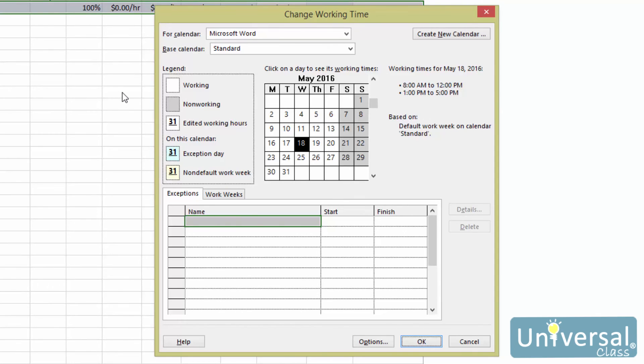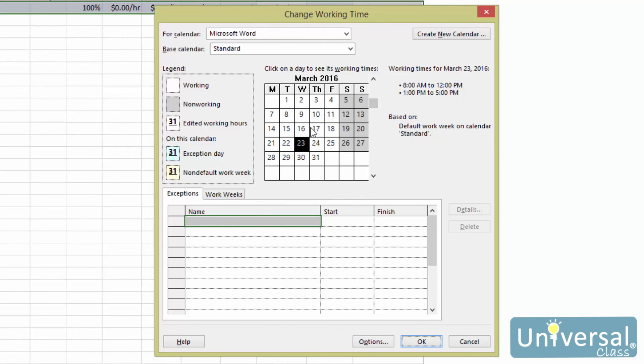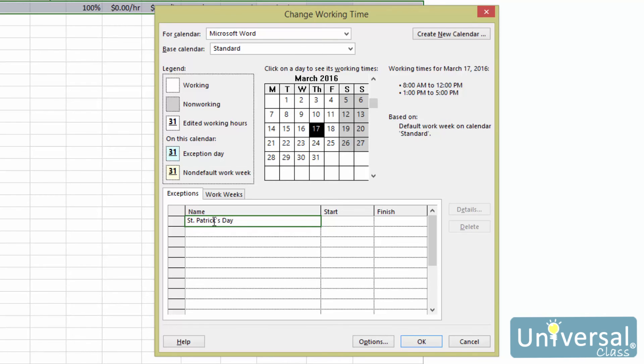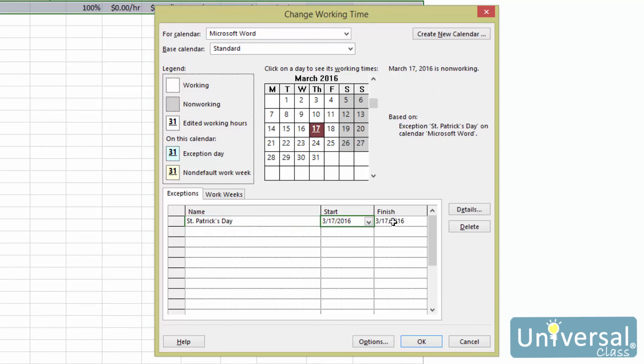You'll then see the change working time dialog box. Locate the day on the calendar for which you want to create an exception. Enter a name for the example in the name field. Ours will be St. Patrick's Day. Add the start and finish dates. Since it's just one day, we enter the same date for start and finish times. Then click on the details button.